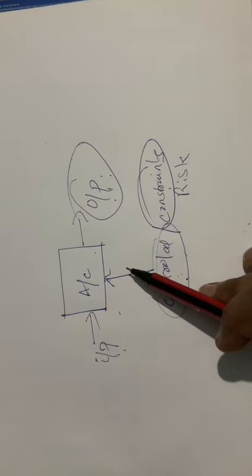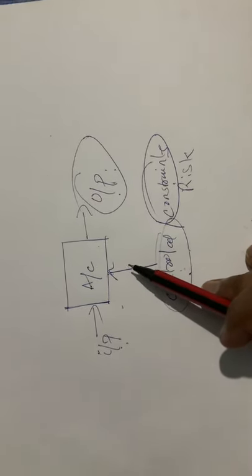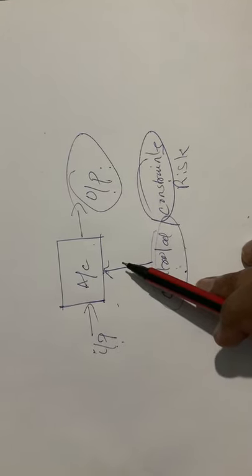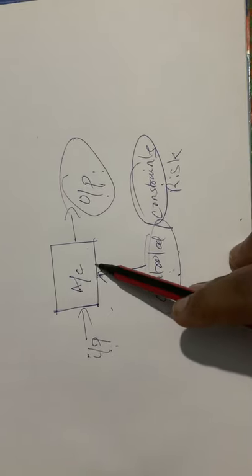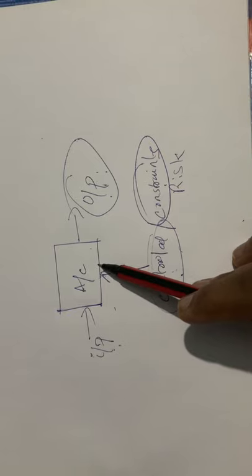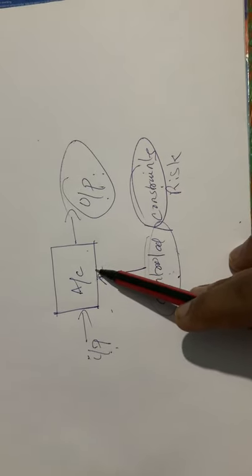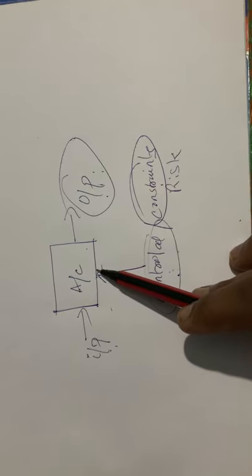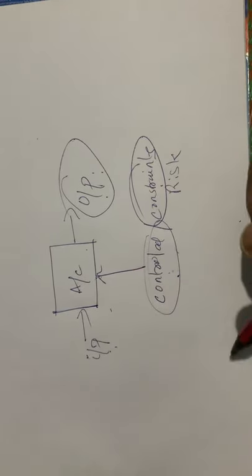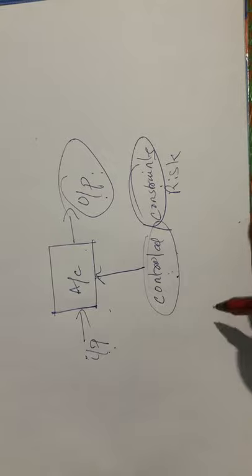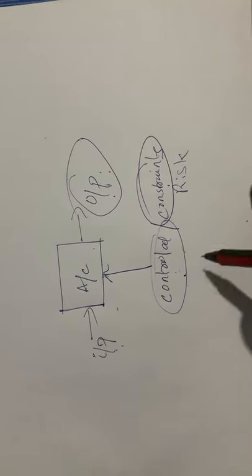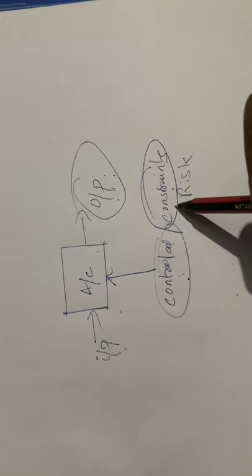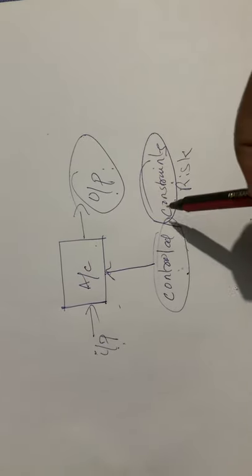For an example, we will be waiting for some supplier to ship some documents, products, or parts, so that won't reach in time. So that will be a risk which makes us deviate from our delivery commitment date and also schedule. And if we deviate from the schedule, our budget will exceed, so client won't pay for that.